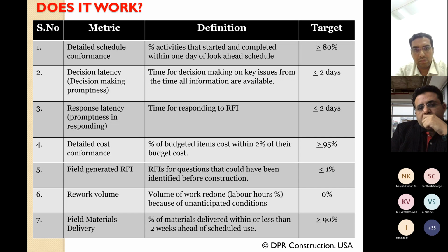We generally found that the savings, when you quantify them, were in the region of about 8% of the overall project value. At least that was what we got in our example, 4 to 8% of the overall project value, which is tremendous. In some cases, that's your entire profit margin right there, as a client or as a contractor.